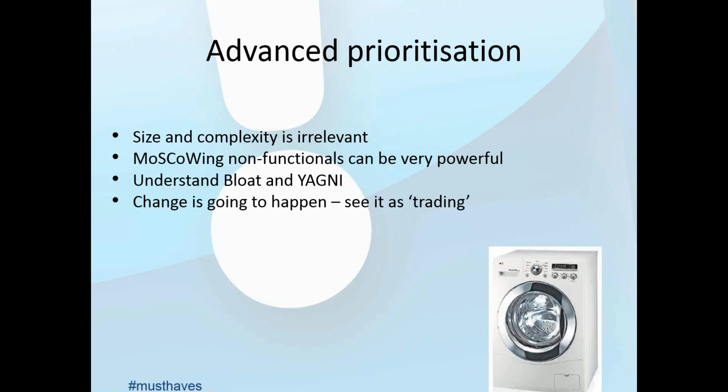Change is going to happen, so don't be resistant to it, and again, see it as trading. And the final tip I'd give you before we go on to a couple of info slides and then the questions is that if you really are confused about whether it's a should or a could, just call it a should could and move on. S/C, just call it a should could. But having said that, that tip is okay by me anyway and works, there's no such thing as a must should.